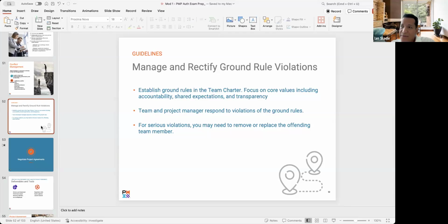So I went back to Stanford and said, okay, if I can get a commitment from Adobe to provide the support that we need, forget about the hours for now, but the support that we need to get us to a successful go live, will that work for you? And Stanford reluctantly said, yes, all right, that can work.